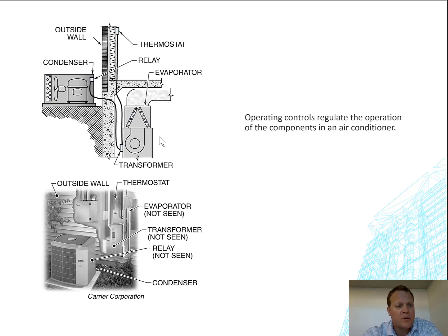So we've got all the coordination that needs to be done for all this. So some of the coordination that needs to be done in front of this furnace is, let me read my notes here. The door to the furnace room needs to be big enough, by code, to let the furnace in and out. So you actually have to have a door big enough to be able to move the equipment in and out by code.